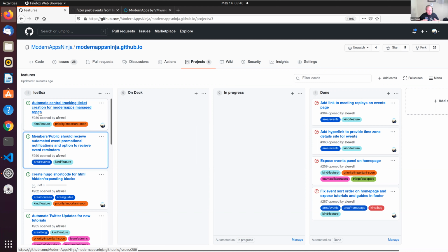That way we have one central view that we can manage. We also want an automation in the inverse, where when we close the issue ticket, we should always close the issue ticket at the source as well, not the tracking ticket. And so we want to have an automation that will watch for those closed ticket events and will close an associated tracking ticket when a source ticket is closed. So if that makes sense, that is this work that needs to be done.